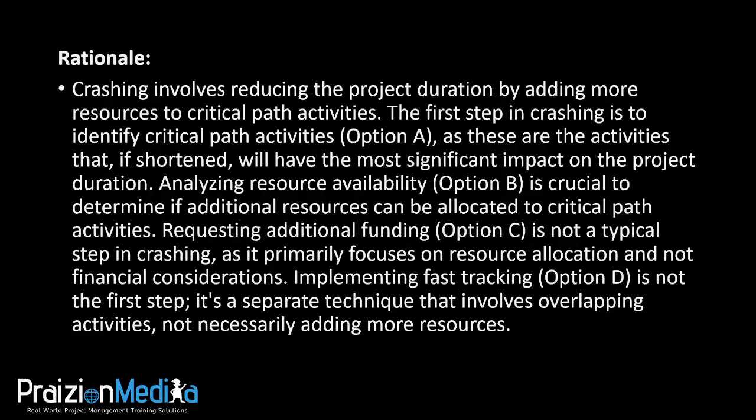So implementing fast tracking is not the first step either. It is a separate technique outside of crashing. And therefore, my friends, the best thing that you would have done as a PM is A, identify those critical path activities, and then understand your resource capabilities before applying those specific resources to do overtime and what have you.